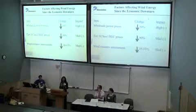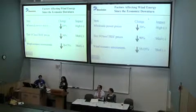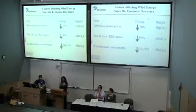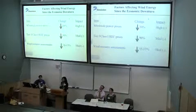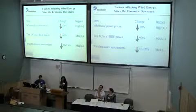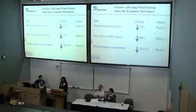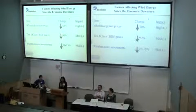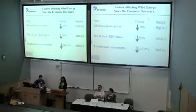And it's because, in the model world, you have a turbine and it's doing everything it's supposed to do. But when you go out in reality, the blades maybe aren't shifting exactly when they should, the turbine doesn't turn exactly to capture the wind, and you're getting these losses in energy. And that's being looked at fairly heavily in the industry. I think probably we'll see some changes in the way they model the energy assessments. But when you build a project and you're making 15% less and the margins are already really thin, that really affects the viability.